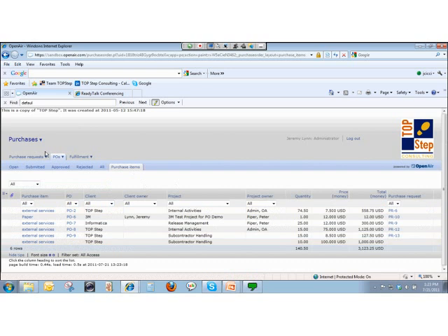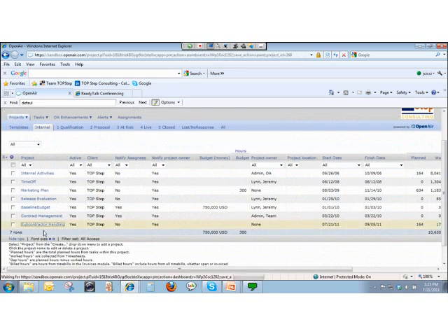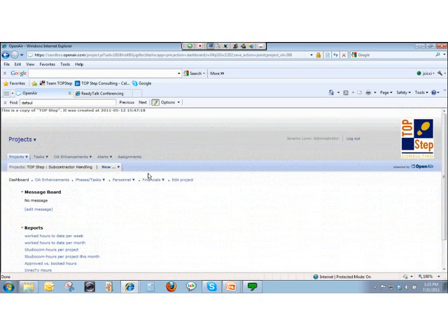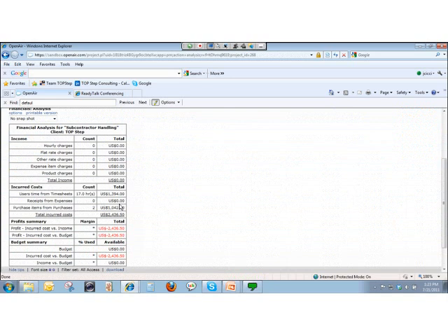But now we're going to go back to the project, and you're going to see how this impacted the cost of the project. So remember, it was $42.50. Okay. Well, now I have 2 items that are ready to be billed, and there's a total of $1,000 for $42.50 because I had purchased 10 stoves at $100 a piece. That's $1,000, so it just bang hit the cost of the project the minute I saved that form. So that really, although I said expense reports are the most simplest, easiest way to put stuff in the system, quick POs are even easier, but the dependency is you have to have the purchases module. Okay.